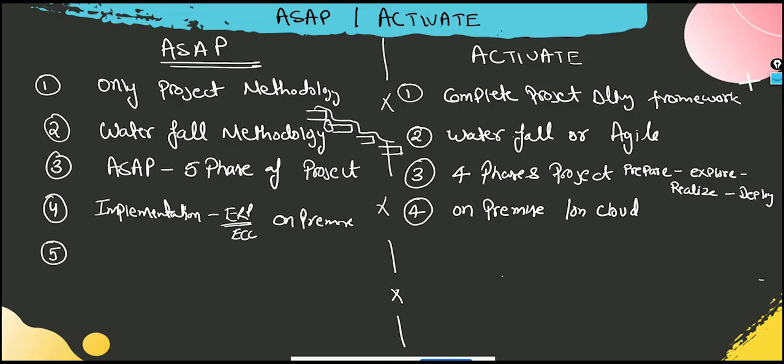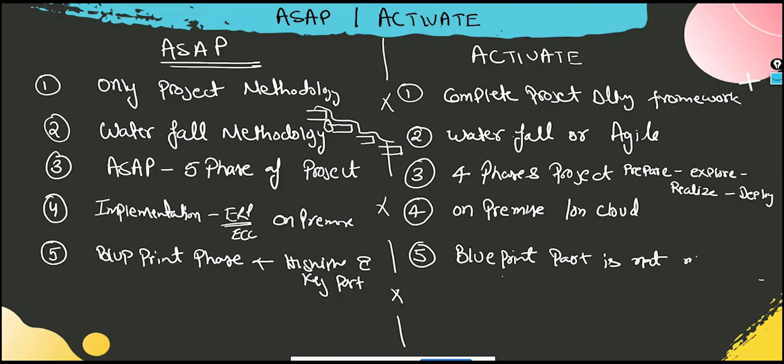Another difference. In ASAP, blueprint phase has been highlighted and would be key part, the creation of the blueprint. In Activate methodology, because it needs to support the agile one, blueprint part is not mandatory.